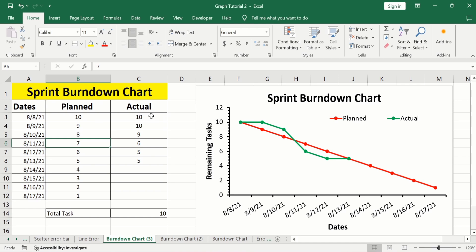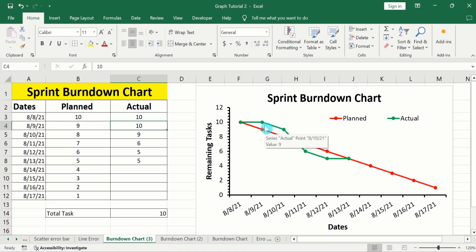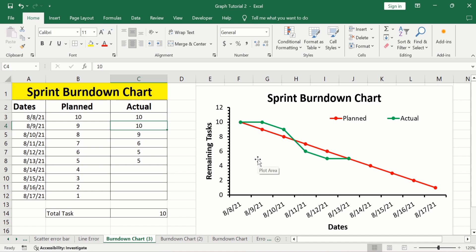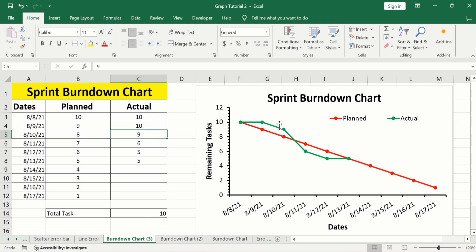Now look at the actual work. We are planning to complete one task on a daily basis, but we are not able to complete that task, so the remaining tasks are 10. If the actual work line is above the planned work line or ideal trend line, it indicates that we are behind on tasks and need to speed up. According to our planning, the remaining task should be 8, but we have not completed tasks according to plan and the remaining tasks are 9.